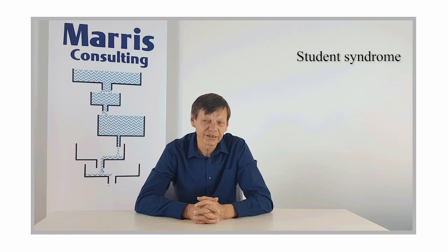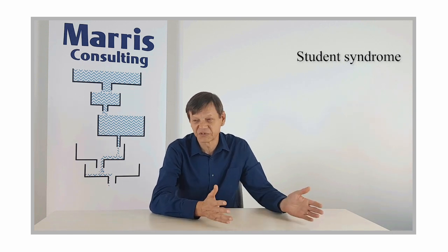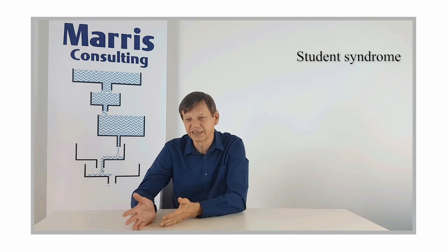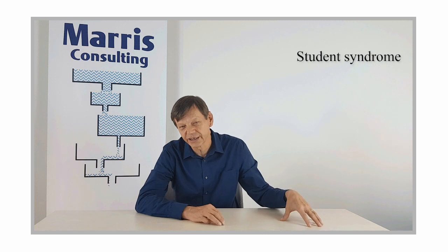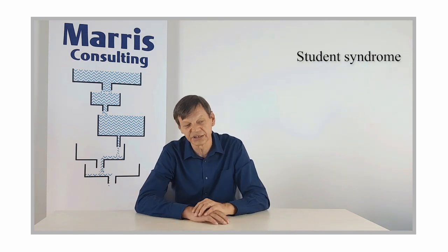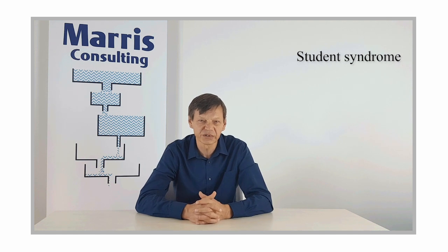Okay, so that's the student syndrome, and it's not specific to students. People in project management have that. I mean, you've got several things to do. One of them is late. This one's got some margin, so it'll sit there, and you'll be working on something else, and you'll always be wasting that kind of margin because of that, the student syndrome.